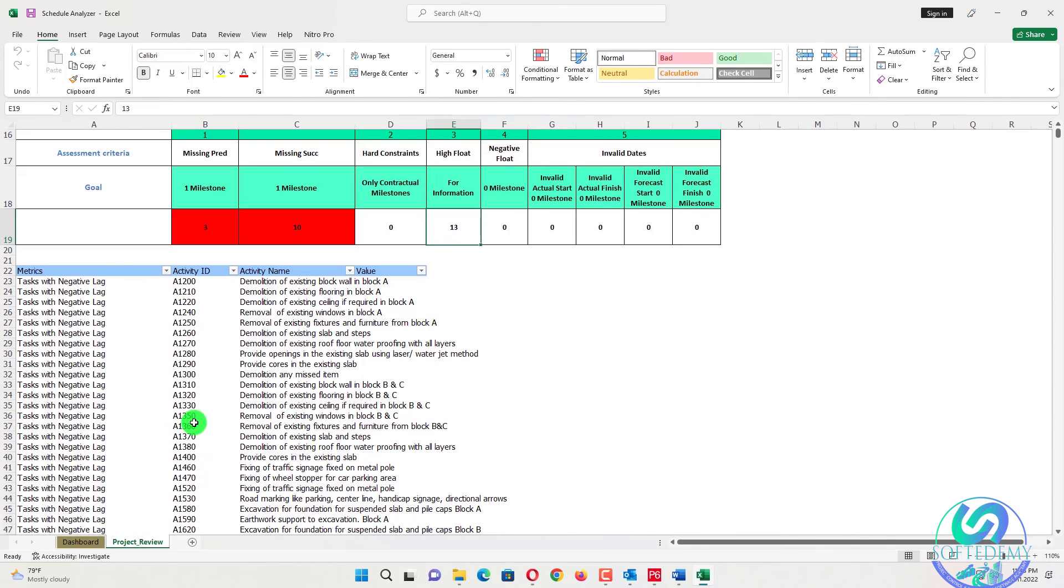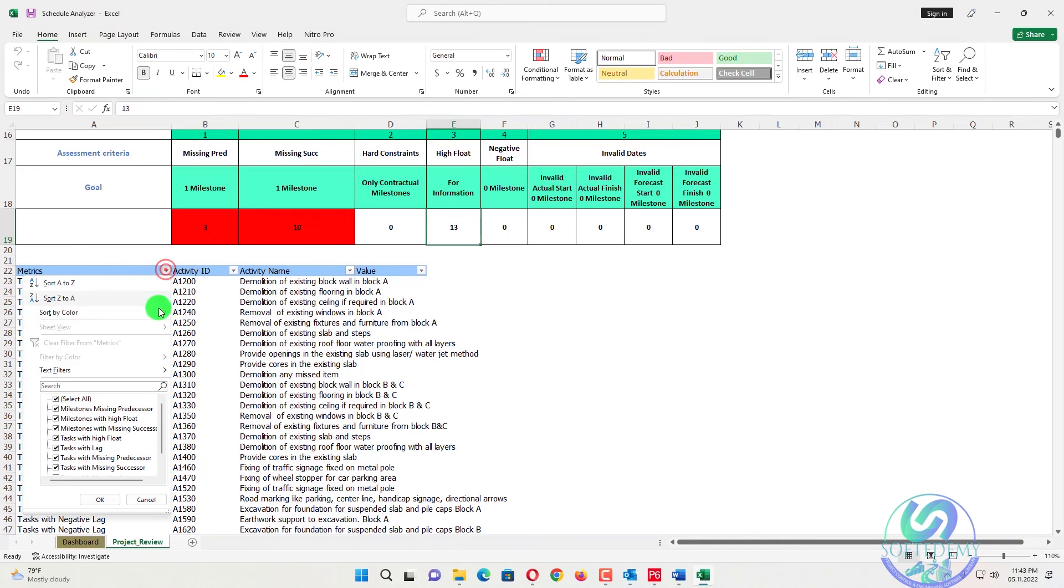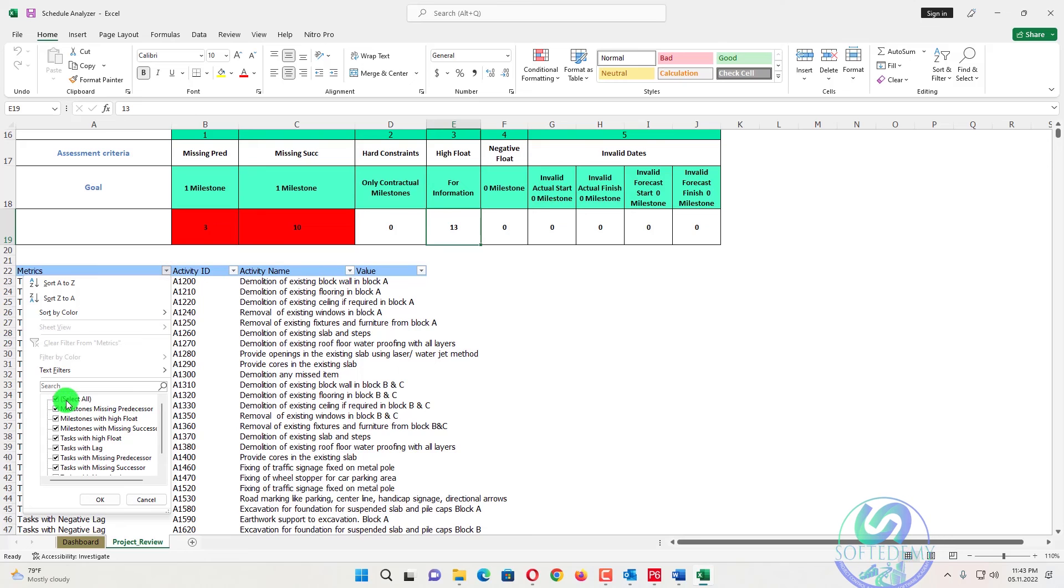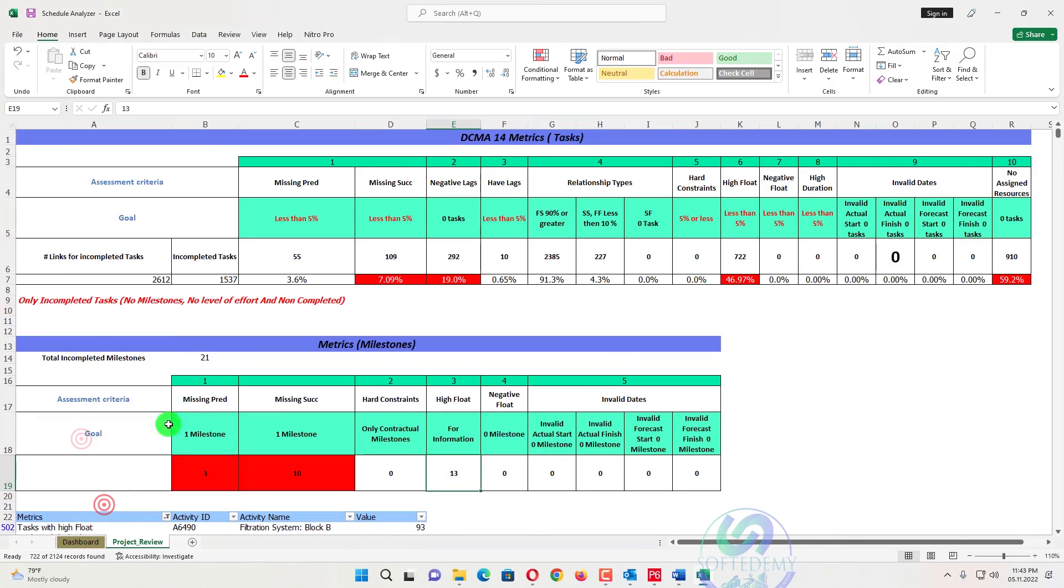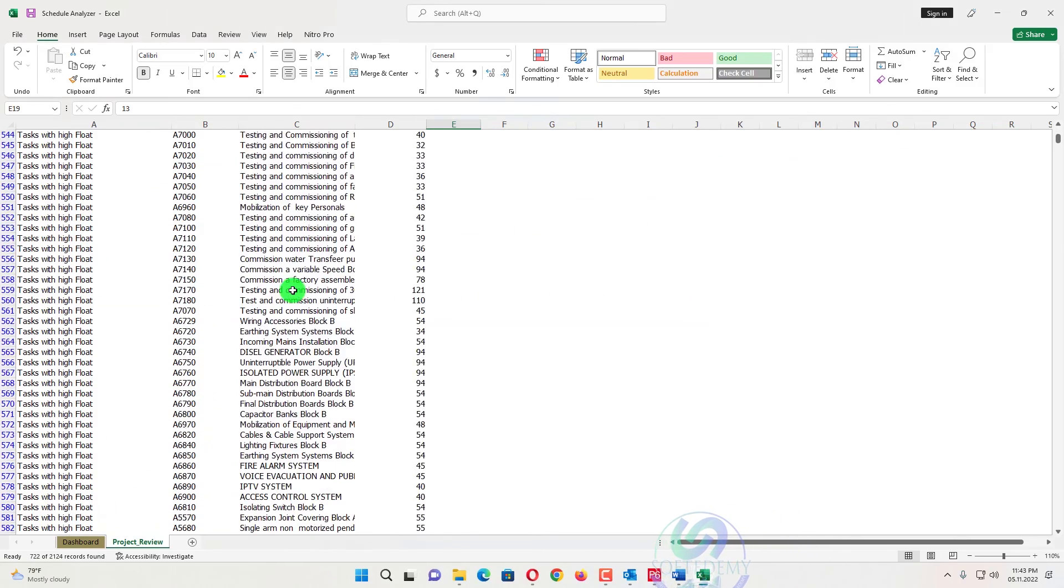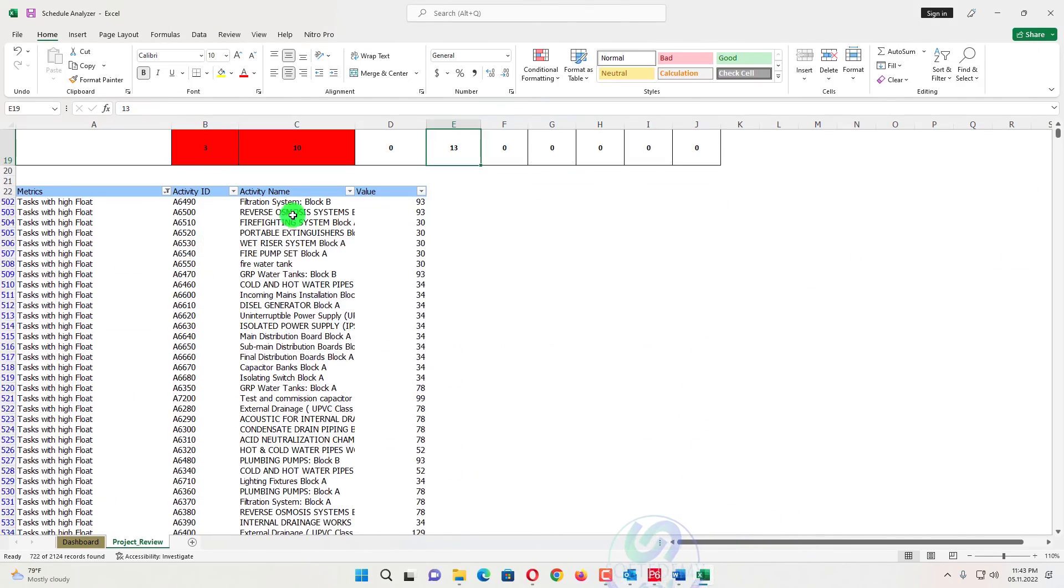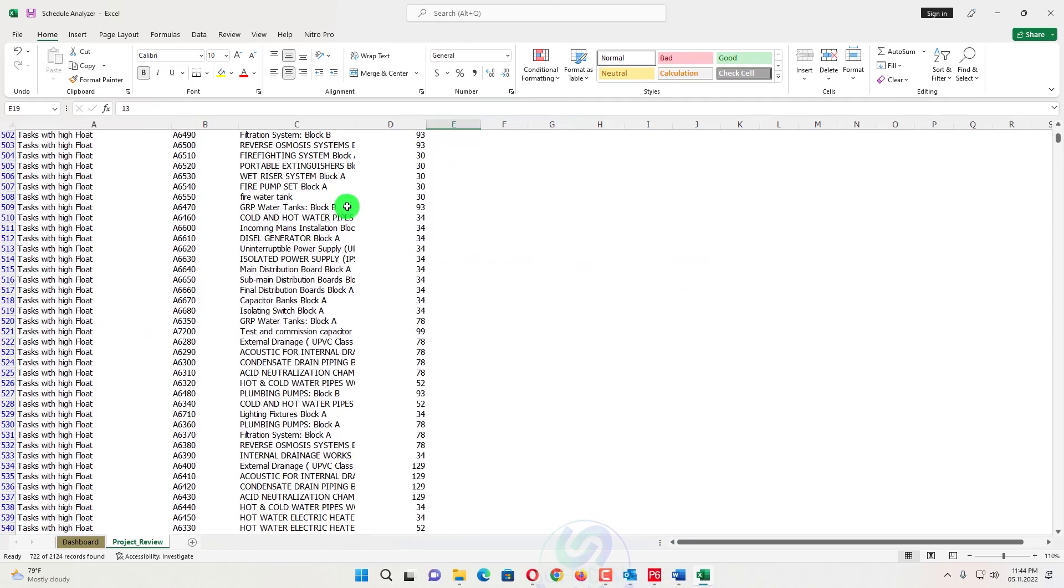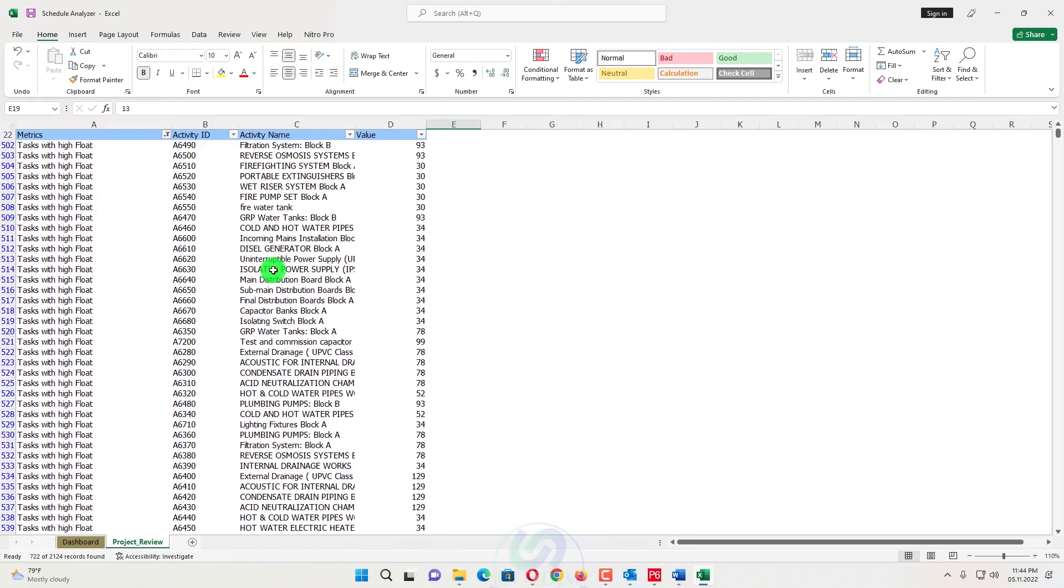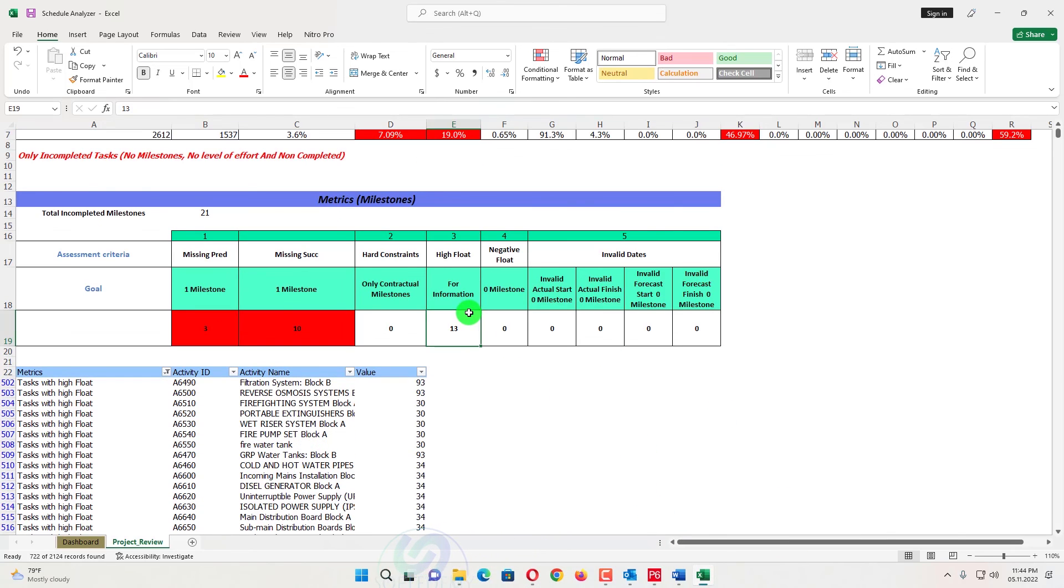So if you want to know how many activities have a task with a negative lag, you can just filter here, all the activities which have been discussed on the top, missing milestone, missing tasks with higher float, you can filter from here. You will know about the activity IDs and activity name, and what are the values. So you will consider here and you can just go in the Primavera P6 and you can search that file easily from there.